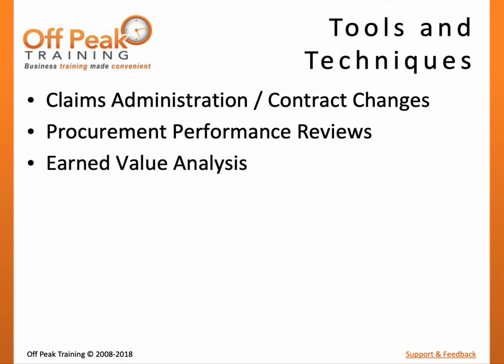Procurement performance reviews, earned value analysis, and trend analysis are evaluations of the seller's progress to meet schedule, budget, scope, and quality. Procurement performance reviews may be buyer-led, while earned value and trend analysis may be seller-led.